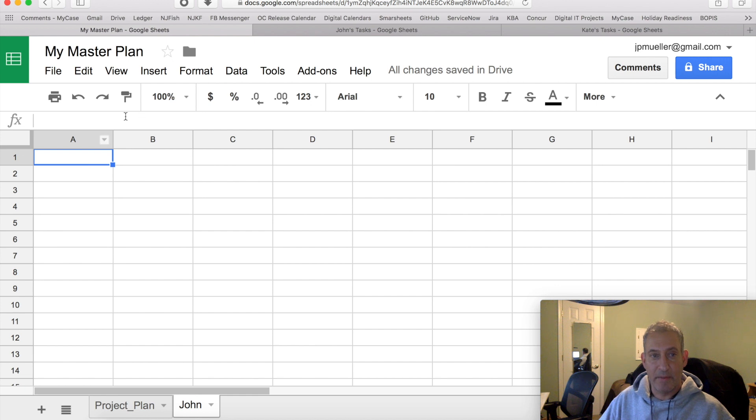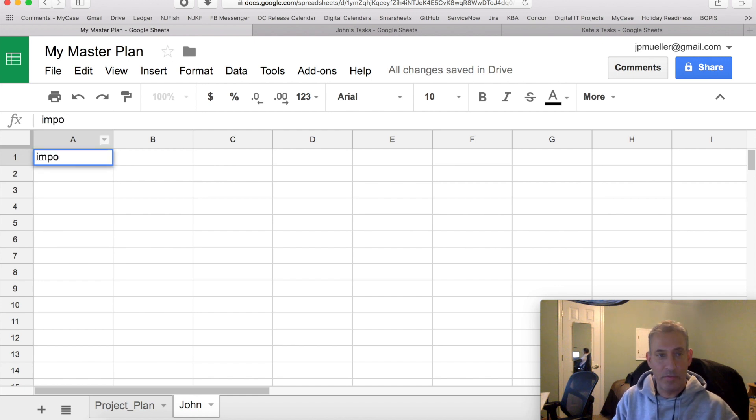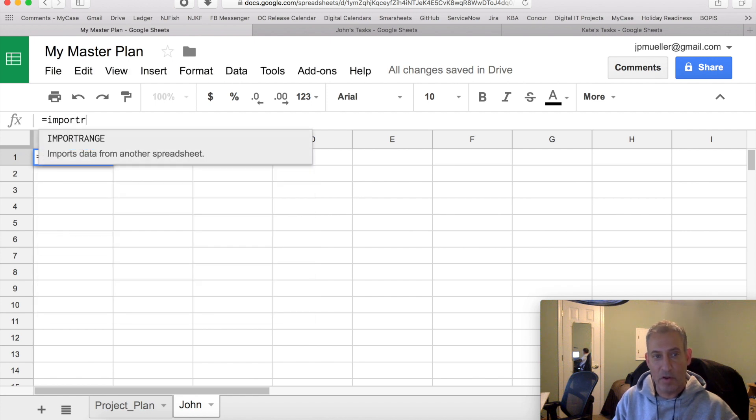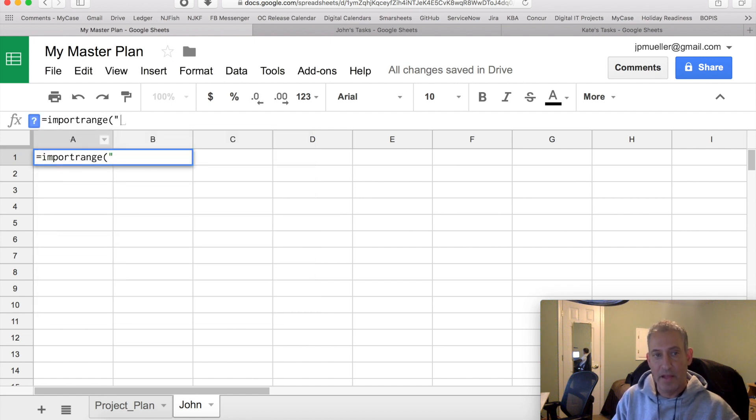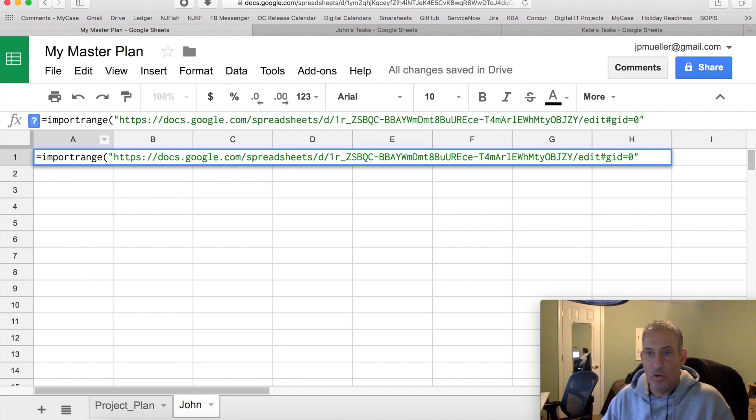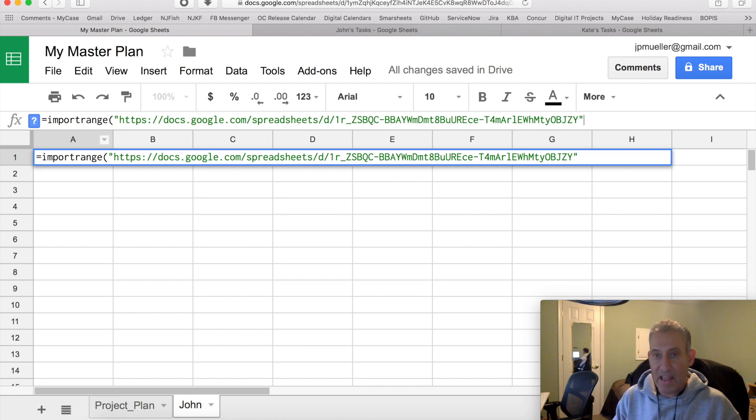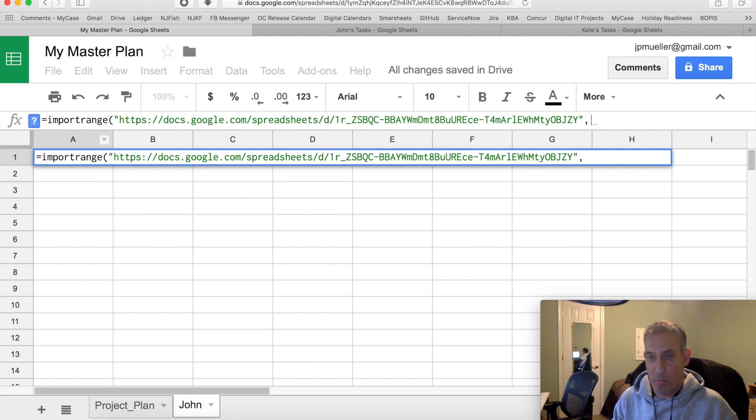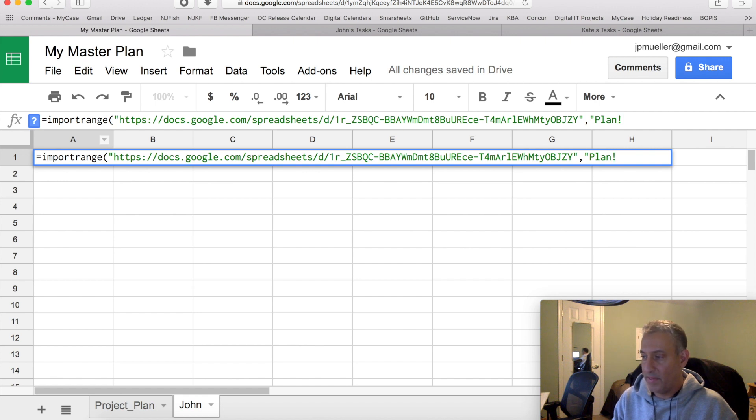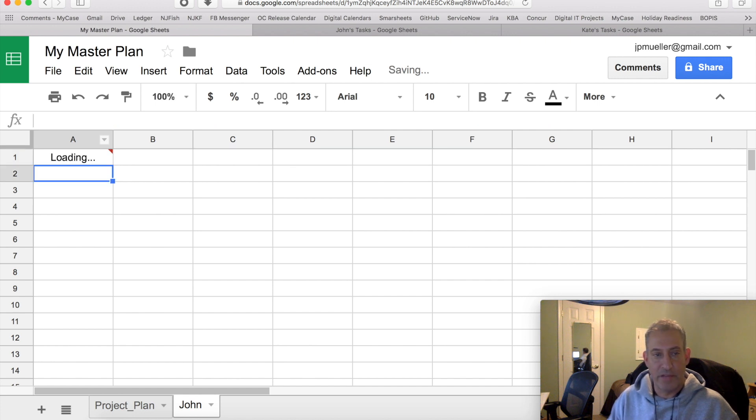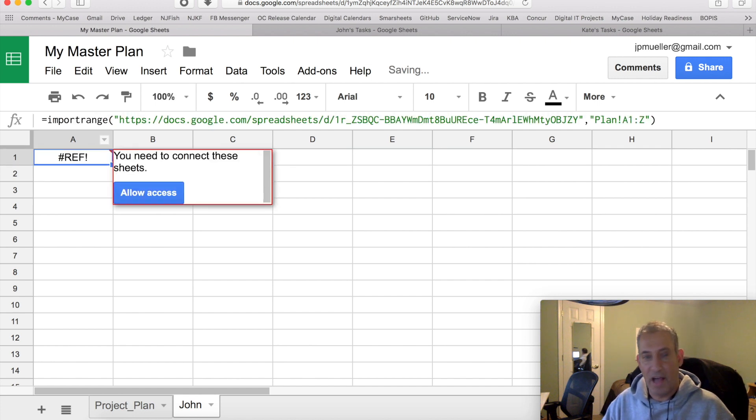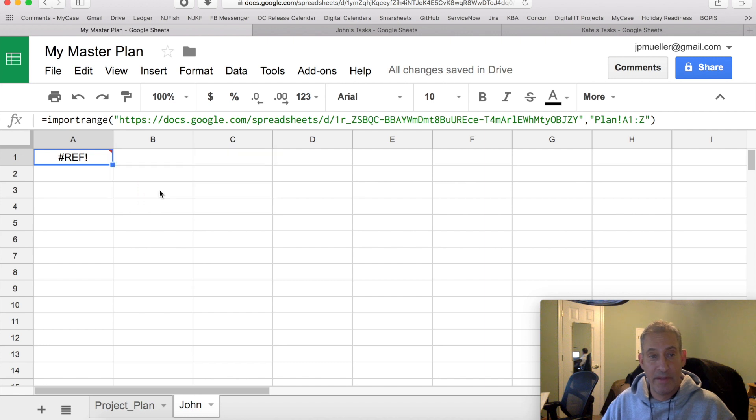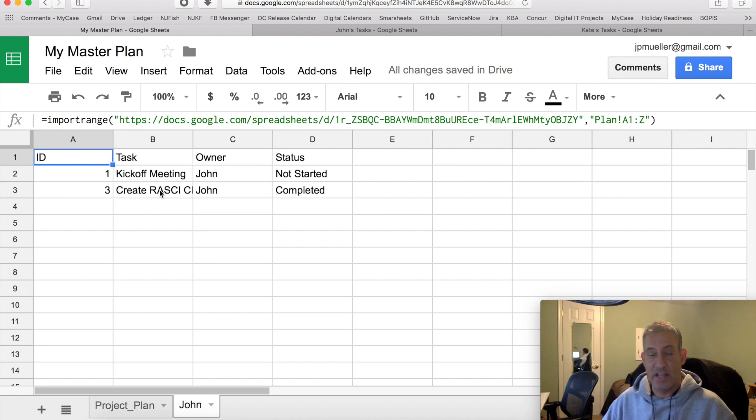And I'm going to go back to the master plan. And in here, I'm going to enter the following formula. Equals import range. And in quotes, I'm going to put that whole URL. And I could get rid of everything after the slash edit. And then I have to put what range I want to actually import from the other sheet. And I do it in double quotes. And I first put the name of the tab, exclamation point, and then the range. And close that tag. And you'll notice I get a reference error. When I highlight it, you ask me if I want to allow access. You've got to do that the first time, and then you're good. So I say allow access. Now we are linked up properly.